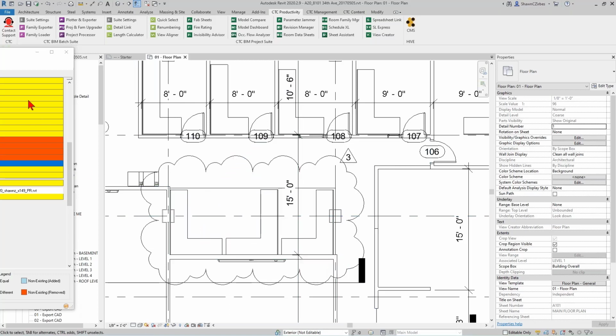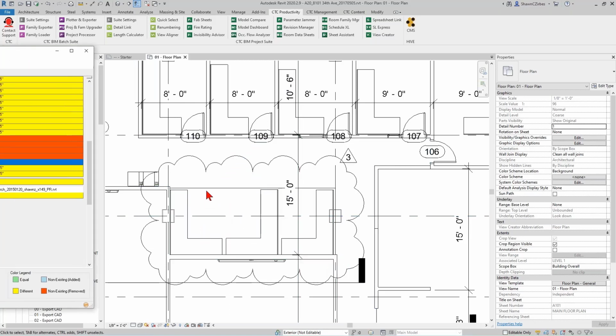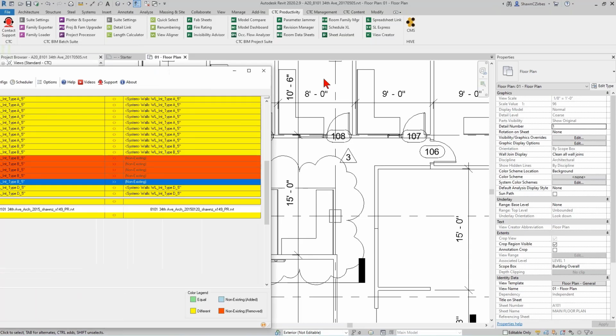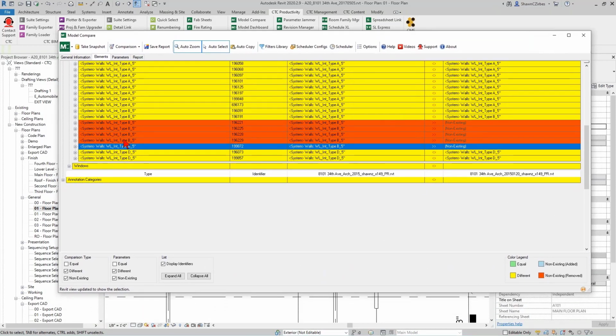And so because of that, maybe I have some things to understand. Now, this is something I would probably pick up in a floor plan, maybe in a Bluebeam comparison, perhaps if that's what you're doing. But there's certain things that you just wouldn't pick up on. Maybe somebody changed a piece of text to say C mechanical, and you weren't paying attention super close to that one little thing. It's difficult to see text changes in some of those highlights. So this here could tell me about that.